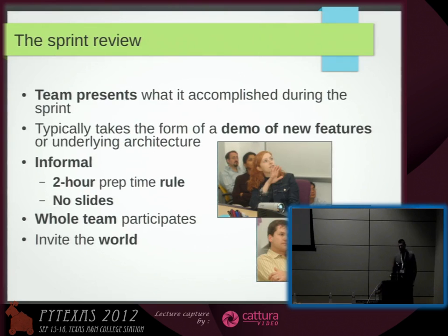At the end of the sprint, the team presents what has been accomplished. What's important here is that it should be a demo of new features. So here we don't want any PowerPoint slides. We don't want anything fancy. Just show me what you have done. The preparation for sprint reviews should not be longer than 2 hours.